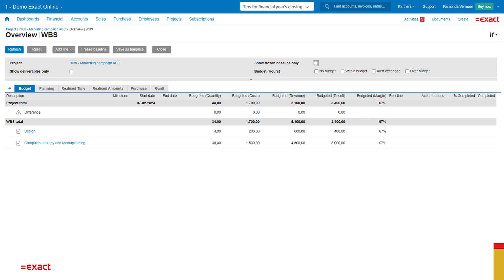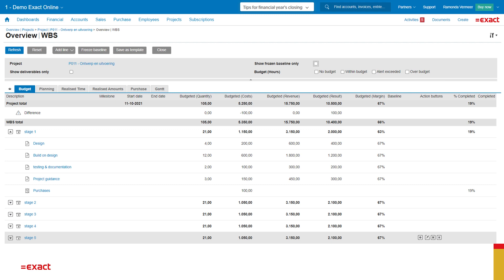I can imagine this looks quite basic. Therefore, I also have a budget with more stages in another project. So this project is based on five stages. Every stage has its own activities. This way I can keep track of my project in detail.